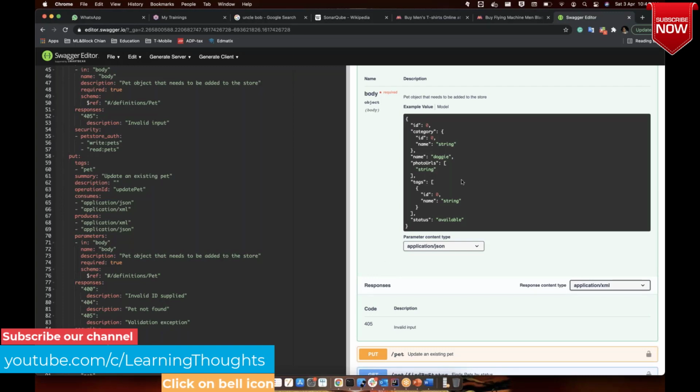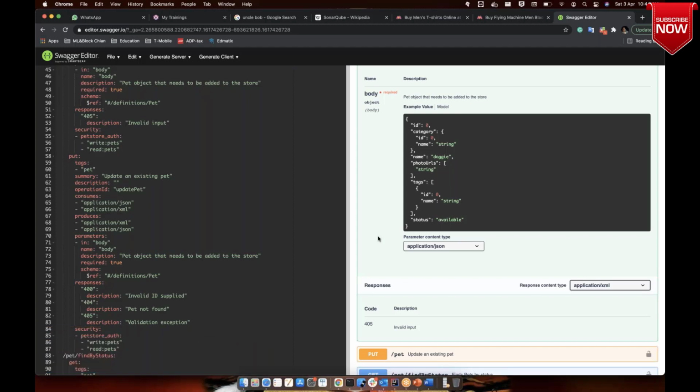There might be changes to this Swagger, but you can do something rather than sitting idle with respect to the API service development stories. By using this Swagger, you can start your development stories for the API integration, and you can make progress. But as a Scrum Master, you need to consider this as a risk factor, and you need to make a label of it saying that this has additional development process that will be included when the real API service is ready. Okay.